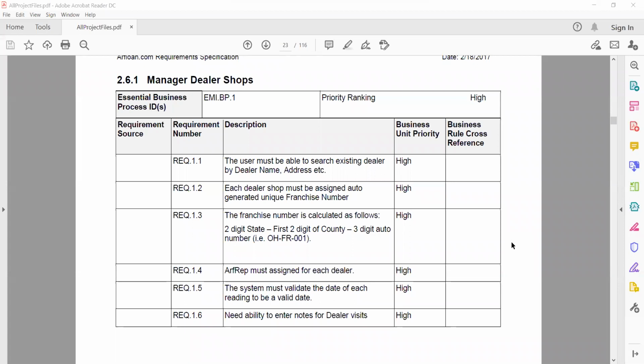And what are the priority categories, just high and low? So typically when the business lays out, and this is the outsource remnant of the waterfall method, they will identify what the high priority requirements are, what the medium ones are, and which are the lower. So typically, if you are running into a time constraint, you first focus on high priority, then you focus on medium, and then you focus on low priority requirements. In the agile world, the higher priority essentially says these are the requirements that I need to implement first. It's the same model, but one is focused within the bound of a 2 week sprint, whereas in the case of waterfall, it will be for the entire project.